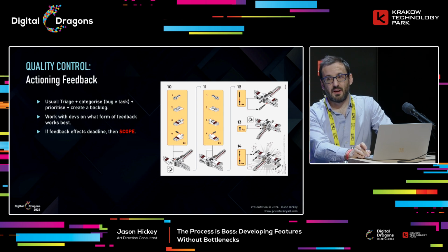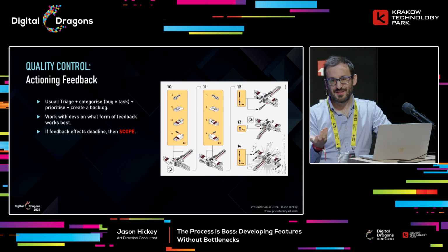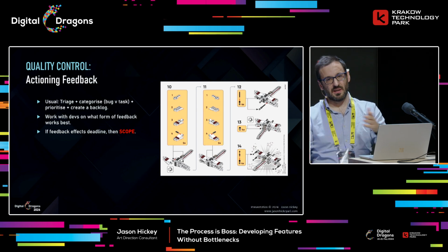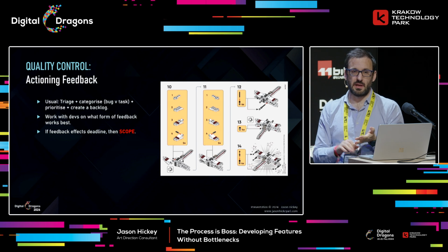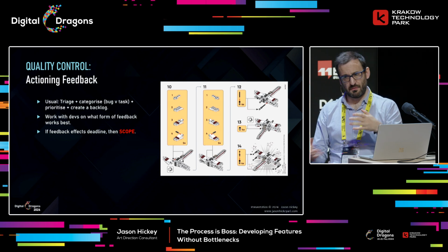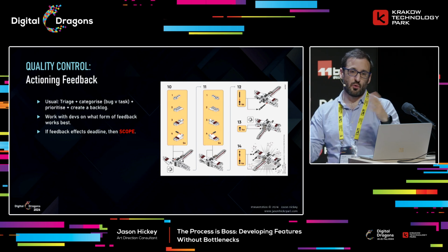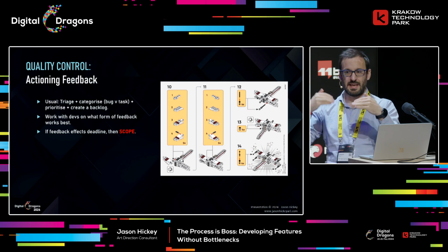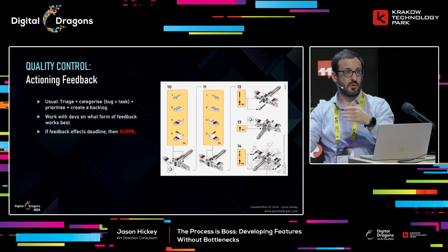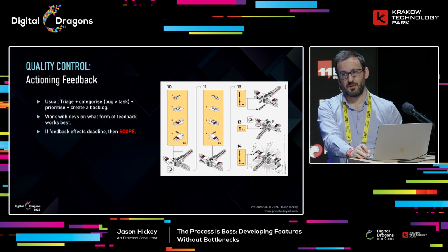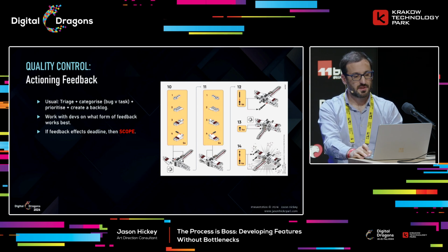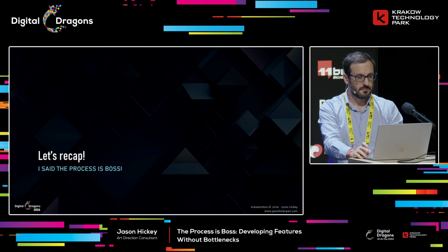So there was a big effort. It's really important that you like her, obviously, for obvious reasons, right? So it was like, okay, cinematics team, we really need to go back, and actually it ended up being a lot about lighting and rendering. So there was a real shift in focus for the core team and the tech art team to get a bit further ahead than they had thought at that point in development. But it had knock-on effects, so other stuff had to be reduced in scope. Okay, so we're at the end.